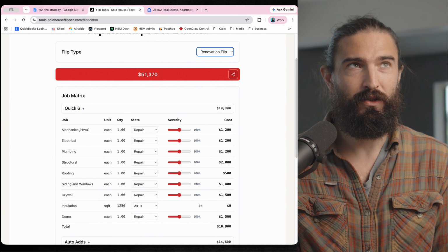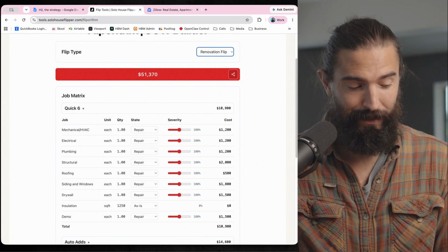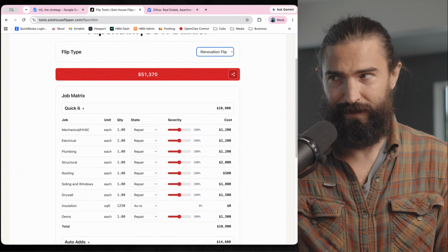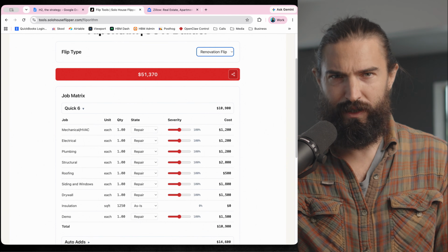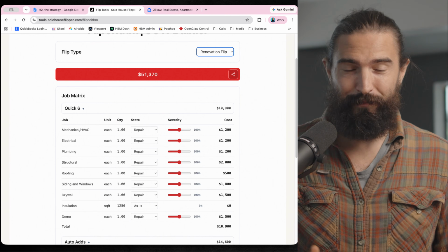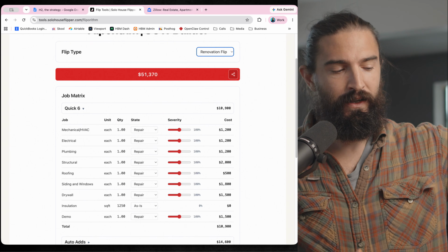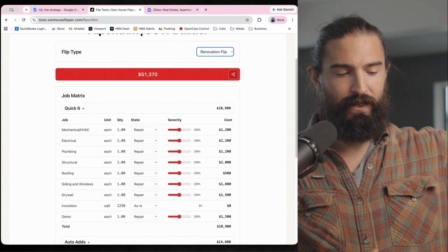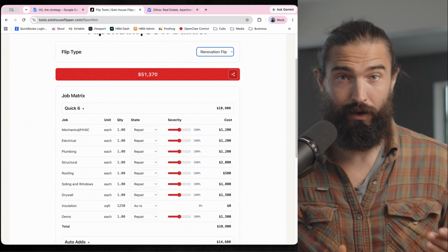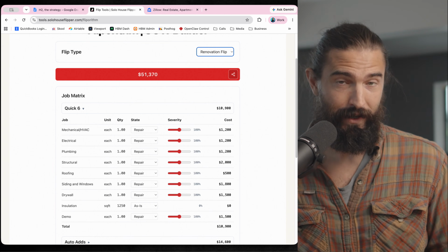he's like, okay, so how much is this one? Where's the spreadsheet? And I'm like, oh, dude, no spreadsheet. Let's call that one 2,260. That number sounds good, right? Because every line item is a sale. Like, that guy knew that painting was $2 a foot, so I'm going to make painting $1.90 a foot. Then he's going to think that it's cheaper.